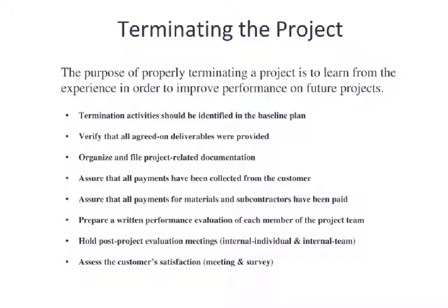The book will detail a little bit more about that, but just understand how important it is. Now, there's financial implications here too. You need to assure that all payments have been collected from the customer and that all payments have been sent out by you, the project team, for material, subcontractors, and other related items. So, have all the payments been processed?